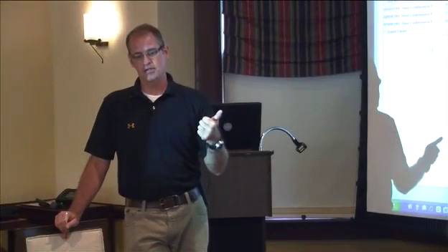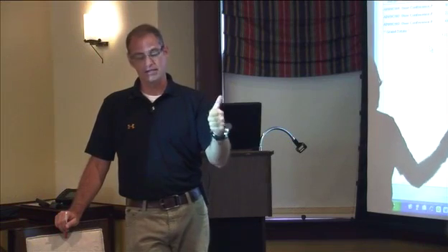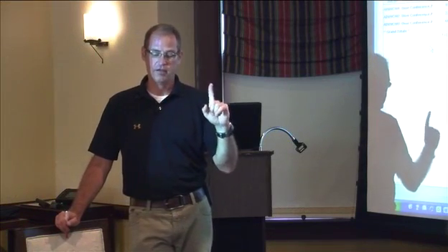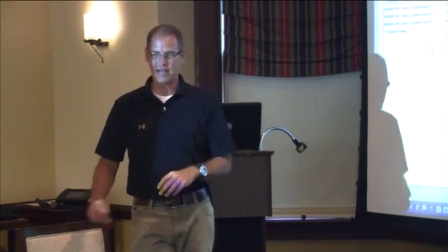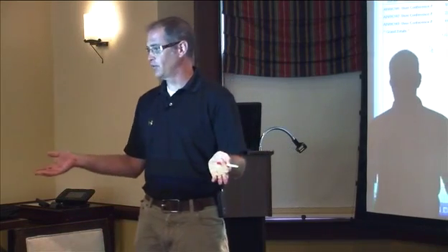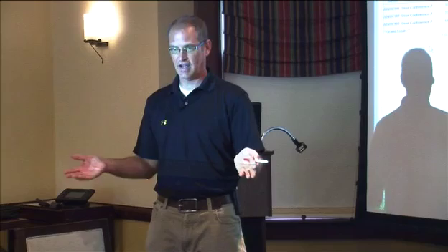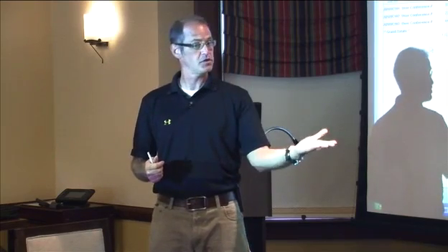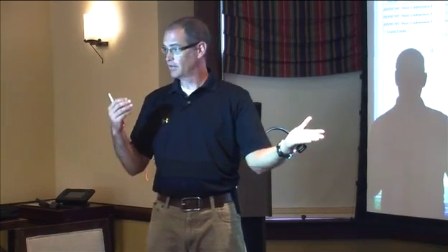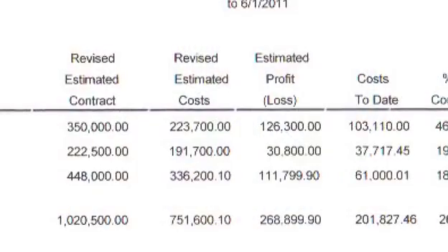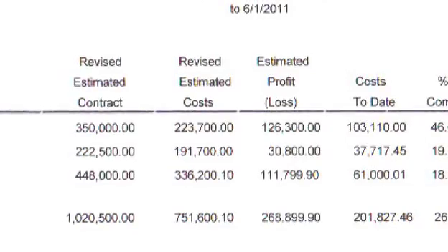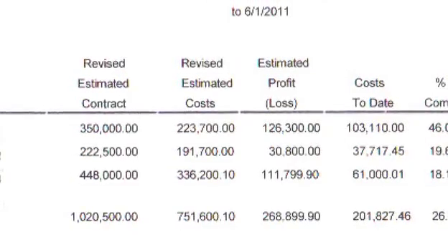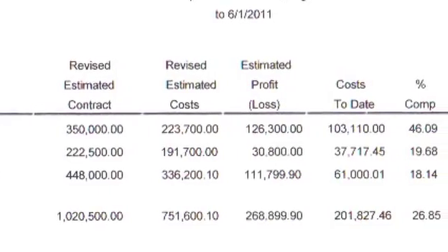So as you're getting change orders in the system, make sure that you've got the contract amount and the estimated cost. Rule of thumb, for the people that say we can't give you the estimated costs on those change orders, I don't care if you break it down by cost code. Let's talk about profitability. At least let me know what you're going to make on this change order. So if it's 5%, 10%, if you want to use the original estimated gross profit on the job, we'll stick with that. The bottom line is that we've got to get some kind of estimated cost in here because the over-under billing report is determined by the percentage of completion, okay?